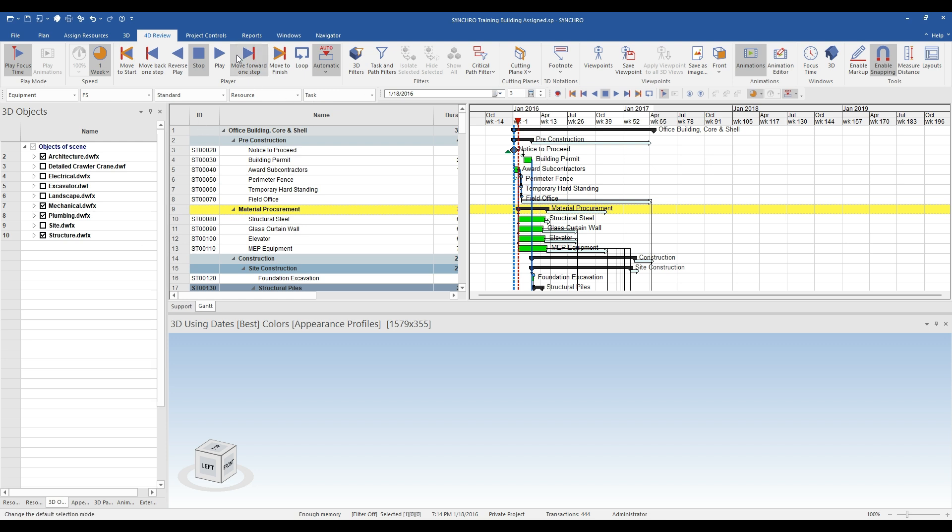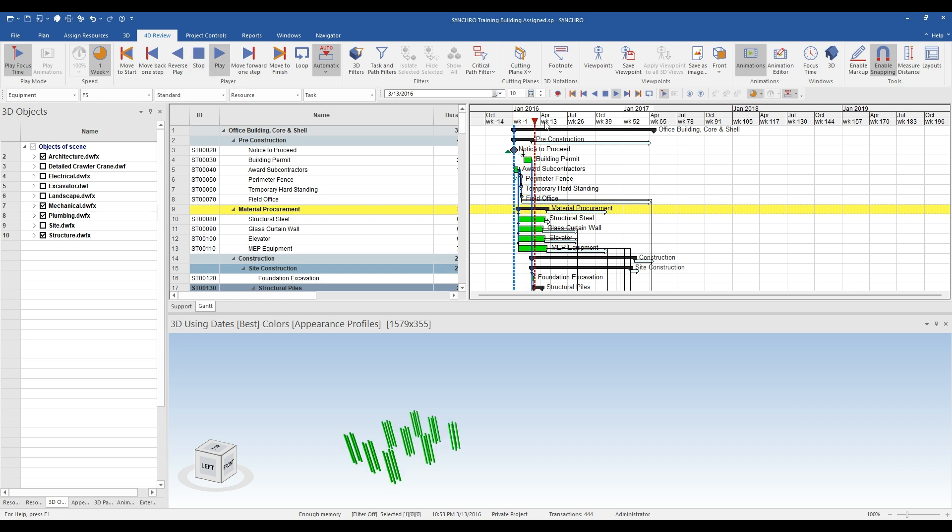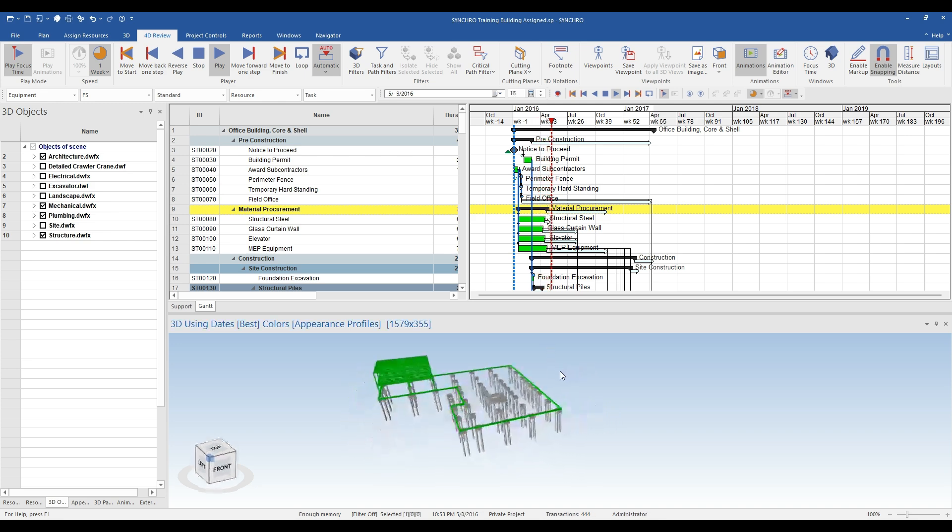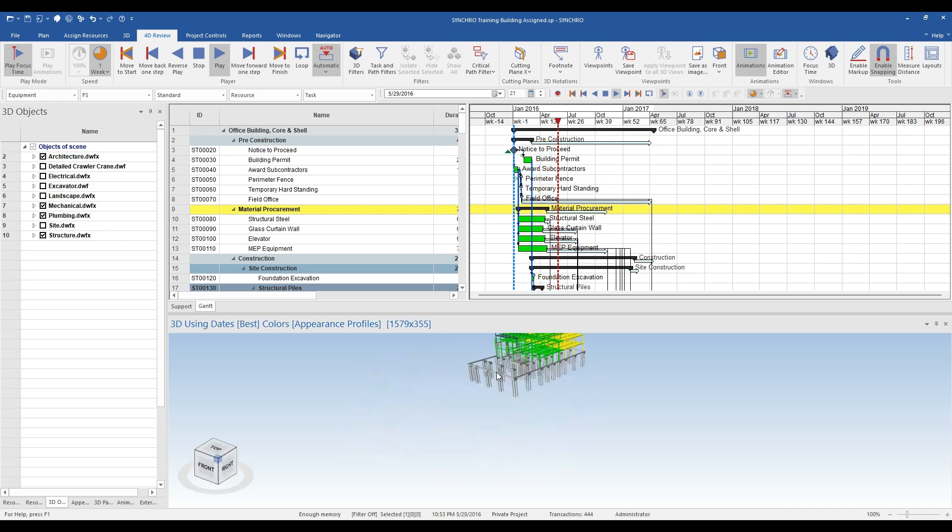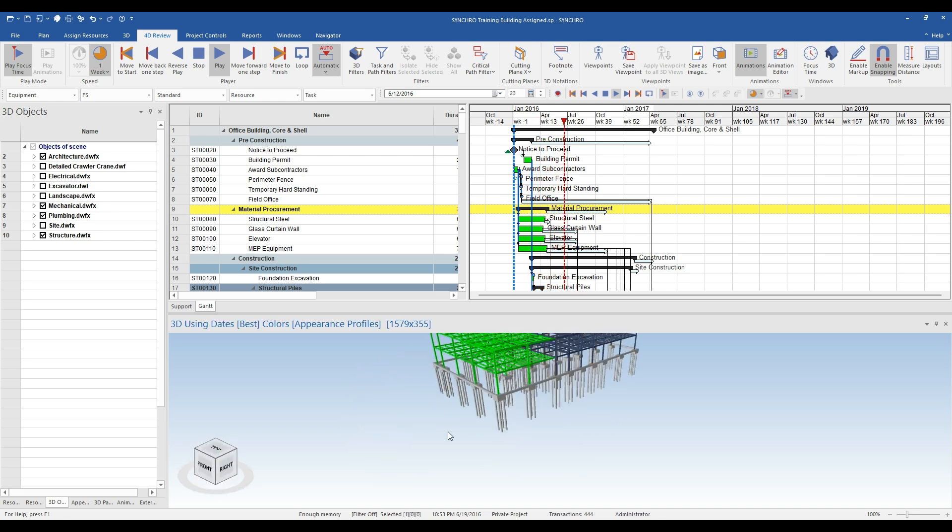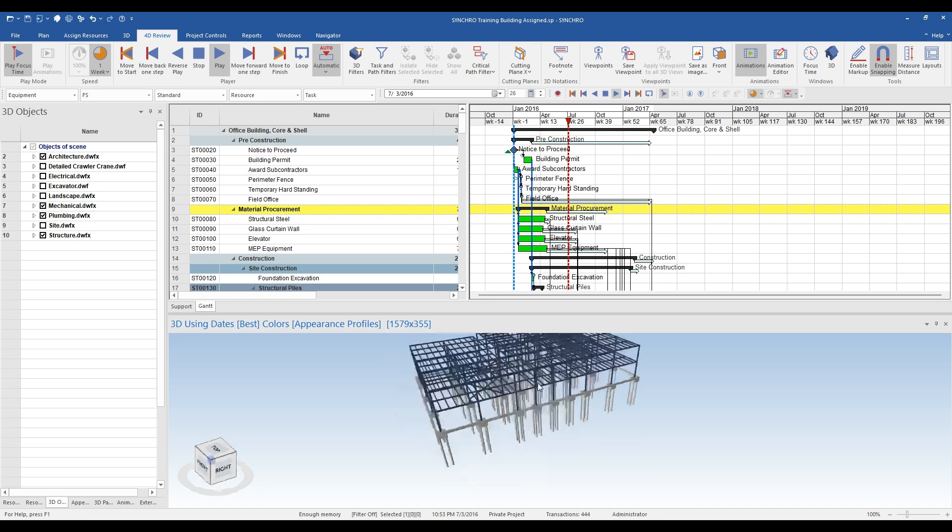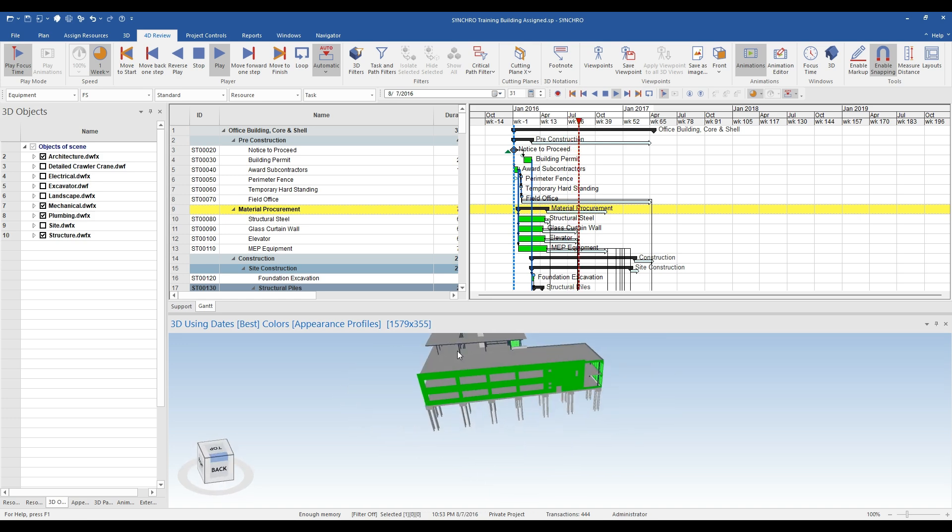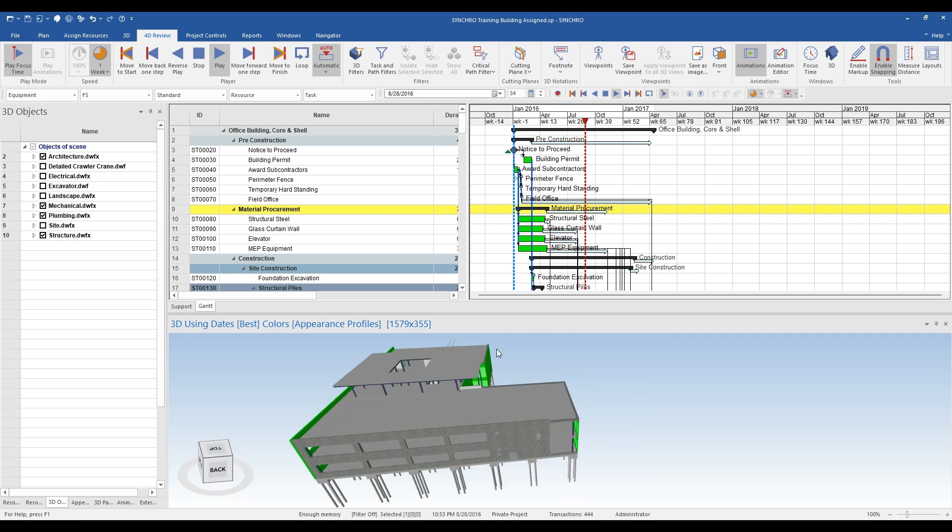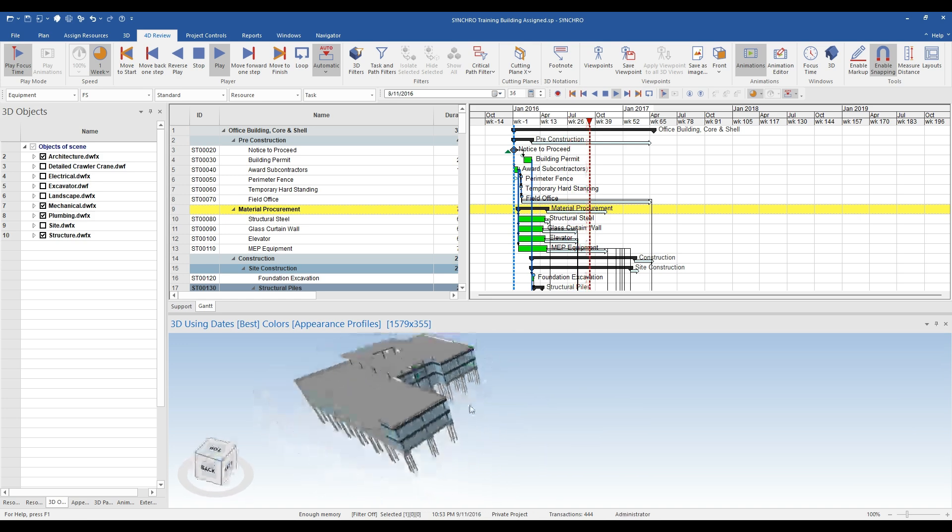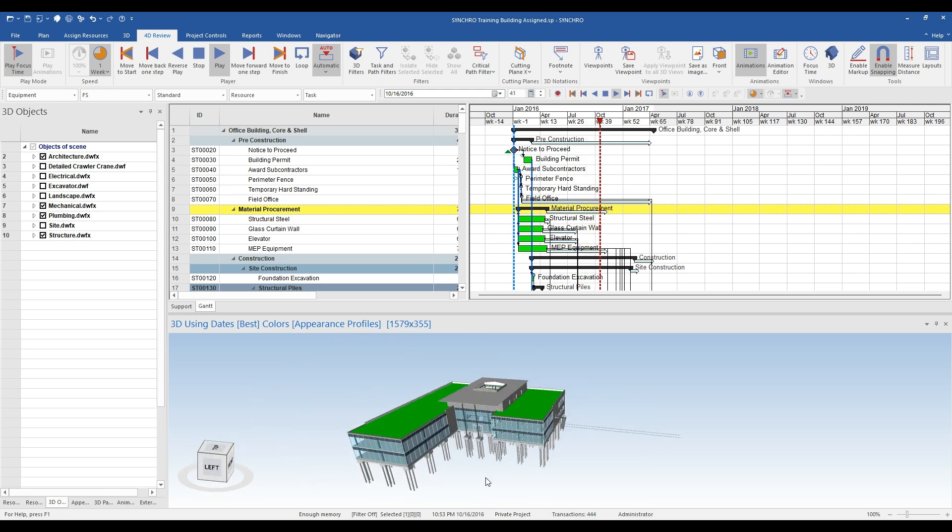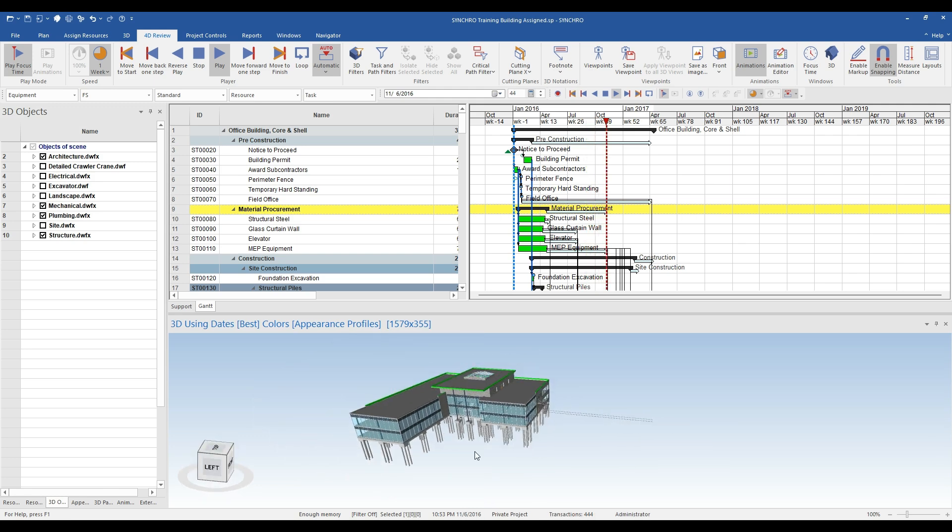We can start out by simply viewing the construction using the Play Focus Time tool in the 4D review ribbon. To do this, I will update the playback rate from 12 hours to 1 week. Clicking the play button will begin the video, during which you will be able to zoom around the model to view the construction from different angles. This is useful to ensure the sequence of construction is correct.